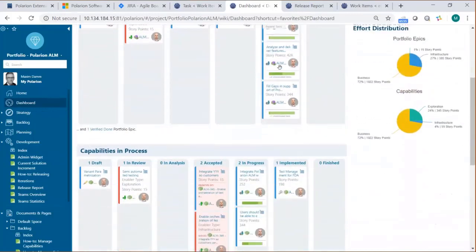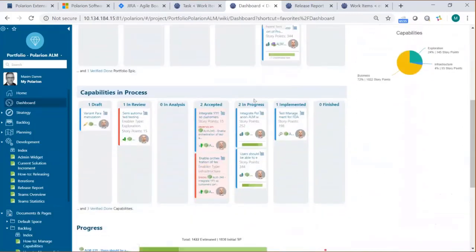But this collects a few different Kanban boards. One of them, by the way, is a different one where we have some shading of dependencies. So if you have dependencies between your, in this case, capabilities, it will be shaded red, and you can't actually continue the capability or feature or user story until the capability that is blocking has been completed.